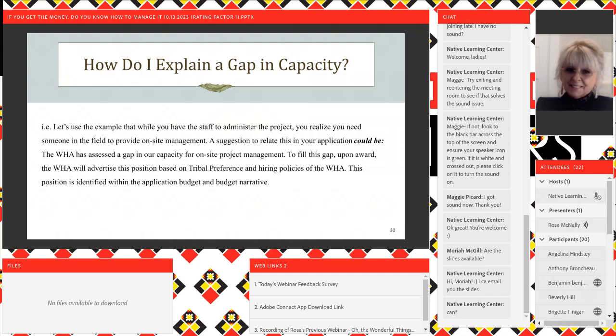But if you're right there on site, you see it for yourself, you know what's going on, you know that the contractors are working, and the process for a change order would require a formal change order. That architect and engineer needs to draw up a formal change order. They need to send it to you. You've got to sign it. The general contractor's got to sign it. They've got to sign it before they can proceed. So by being on site like this, you've already instantly identified, I've got to do a change order.